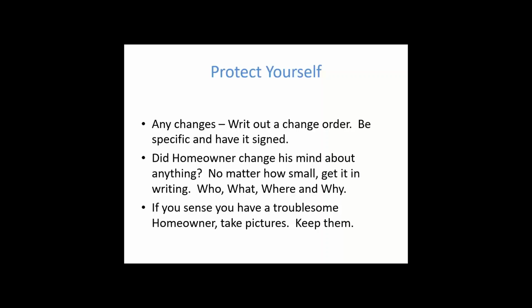If you sense a troublesome homeowner, take pictures and keep them. I've had a couple of cases where a contractor is trying to do his punch out, the installer's trying to finish up with his punch list and still has a ways to go when a homeowner starts moving in, literally starts moving in without the C of O, and the contractor is afraid to say something. They figure they're almost done. What does it matter? It matters.